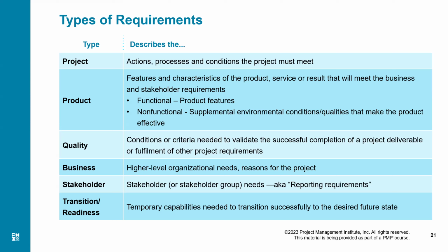As soon as a project suddenly becomes infeasible, we should recommend the closure of that project to the higher management, right? Because when we started the project, it was feasible, and so the charter was issued. But during the life of the project, if the need for a project is no more, if there is no business need associated with this project anymore, this project does not have a reason to survive. It should be closed down.